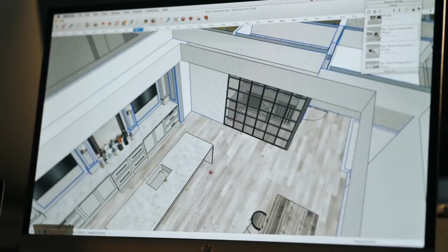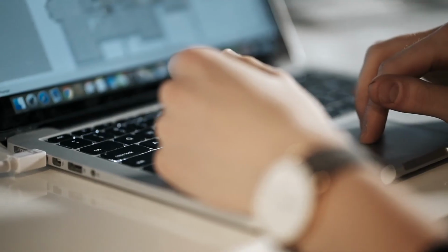We're not only presenting our design, but we're also keeping budget in mind. We are doing price point check-ins throughout the design process, so we're able to course correct throughout the design instead of getting to the very end and being over budget without realizing it. Budget check-in is a critical and unique aspect to the design build process that you don't get if you hire a separate designer and a separate builder to try and complete your project.